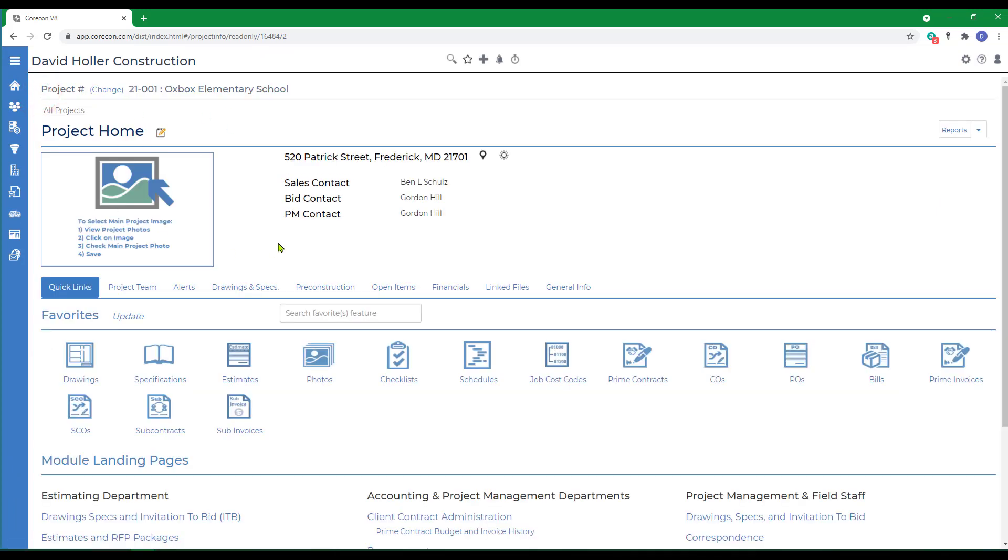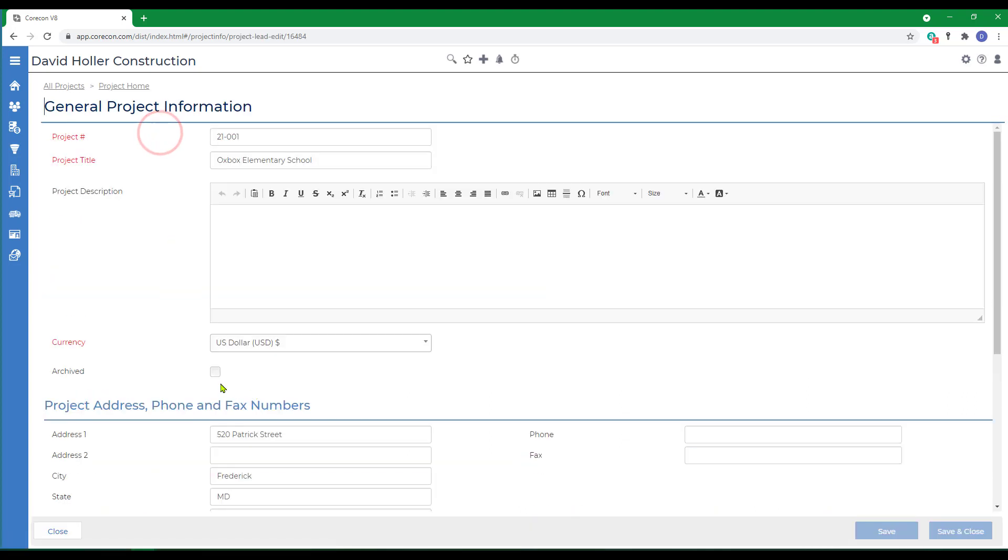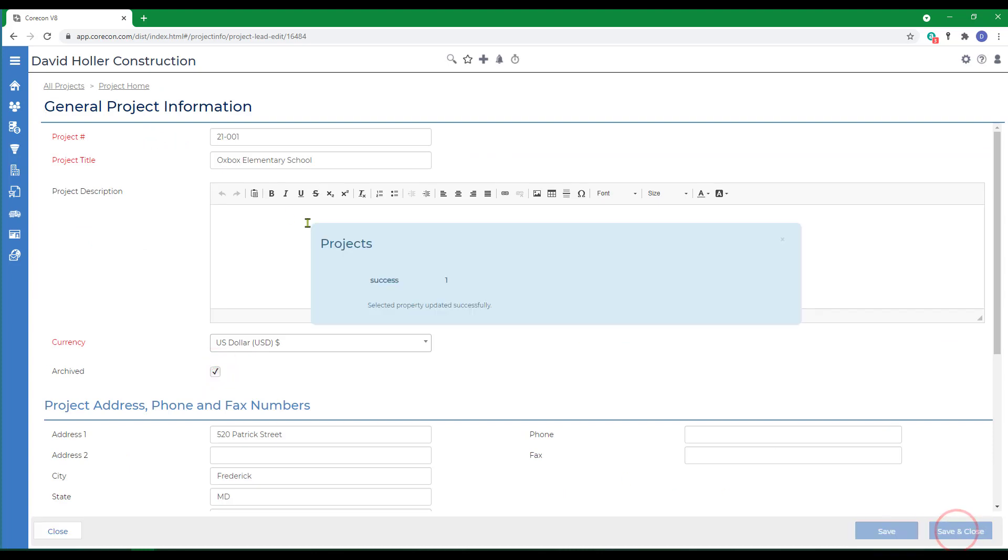Once a project is complete, the prime contract has been invoiced completely to the project owner or customer and procurement items are approved and closed. You can go to the project home and click the edit button and click archive and click save and close.